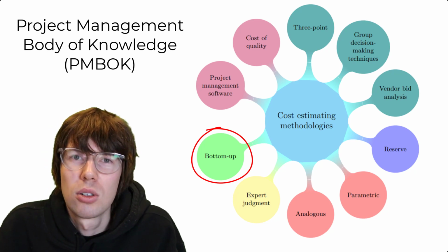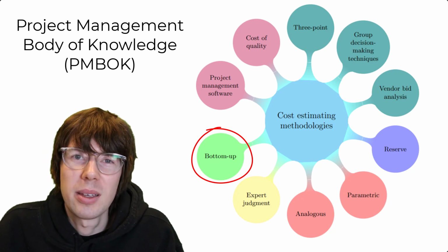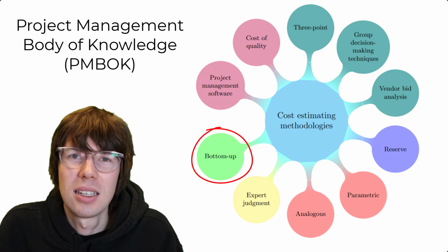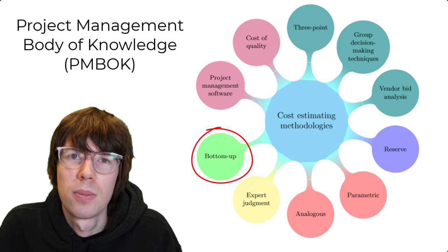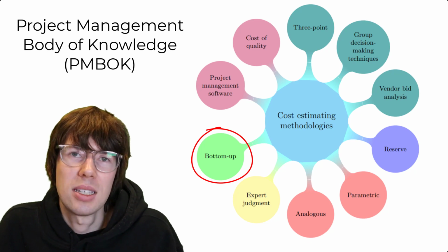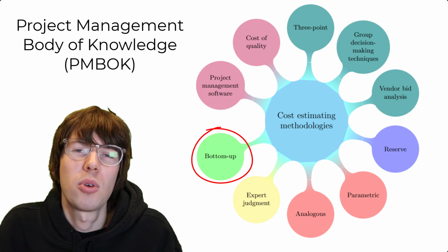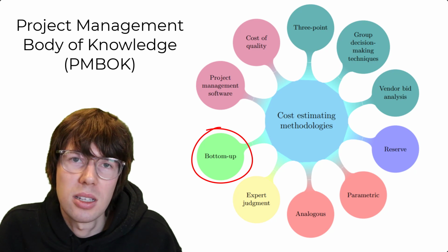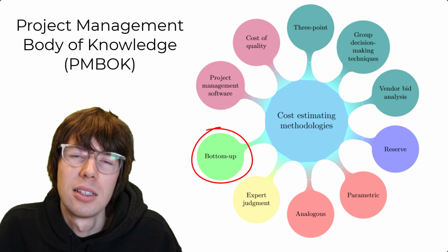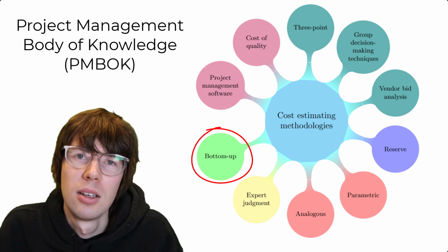So basically, when you don't feel there's any benefit in disaggregating any further, then you reach what's called a work package. So a bottom-up approach involves making a list of all these work packages, estimating the cost of each work package and summing them up, instead of just trying to estimate the cost of the entire project outright. So a bottom-up approach: make a WBS, try to estimate the cost of each work package instead of just calculating directly the cost of the entire project.